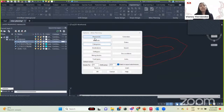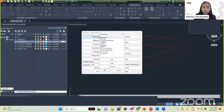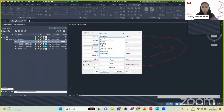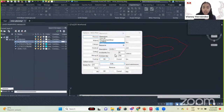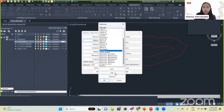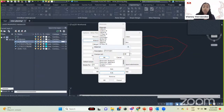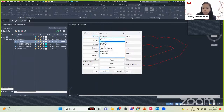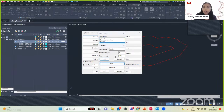Someone wants to know the difference between resources and materials. Resources are things that last more than once — for example, equipment you can use for many years — so it has a cost per day. Materials have a cost per unit because you use them only once. You have to get many units of materials compared to resources, which last a long time.